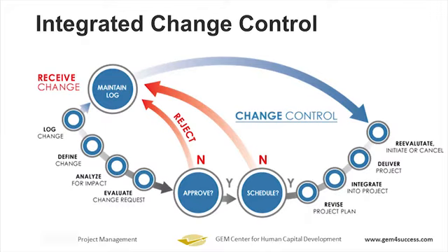Not you this time now. You submit the change request to the body who evaluates it. You understand? And then they either approve or they reject. If they reject it, go and write it inside your log. Don't forget that once the change request comes, we'll log it that a change request has come. So even your change request has a log. You understand? Change request also has a log. So even if it is rejected, you still log it. That this change that I wrote on this date, update the status that it's rejected.